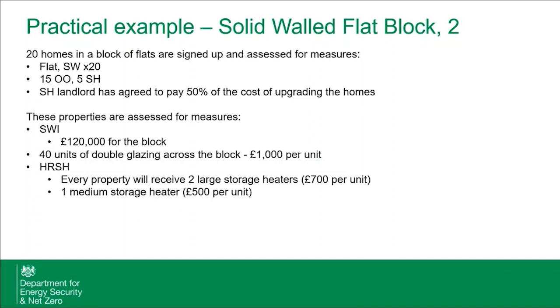Obviously you wouldn't be able to submit that to us, you'd submit us the individual batches, but then that'll tell you how much of each allowance you've got, whether you've got any headroom left, because of course it provides you with an average cost of measures to date, average cost of spend to date, and things like that. So yeah, you can just use one batch form to cumulatively check all of your costs, if that's helpful.